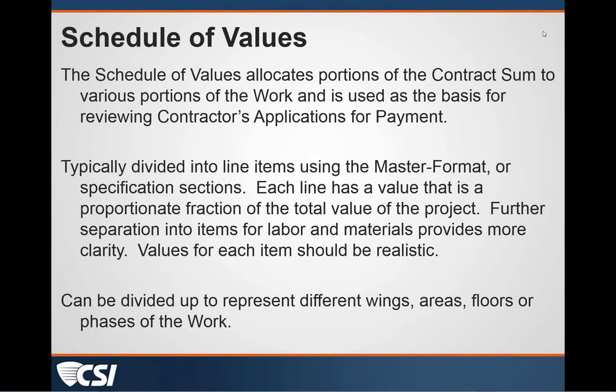Yes, and to go further with these breakdowns, typically you will explain how you want it broken down in your Division One payment procedures spec section. So if you want it by phase, if you want it by floor, if you want it by wings of the building, you can specifically tell them that in Division One, and it becomes a contract requirement.